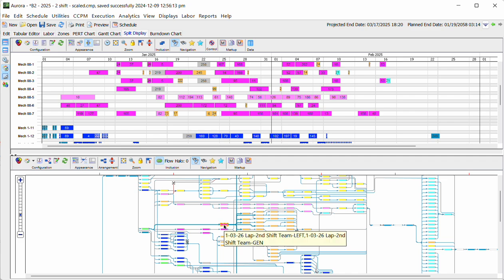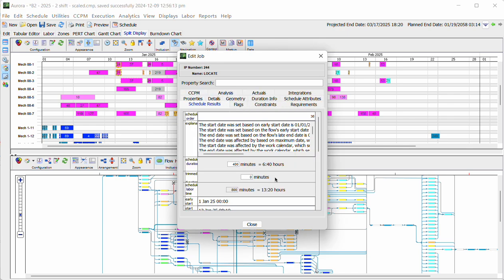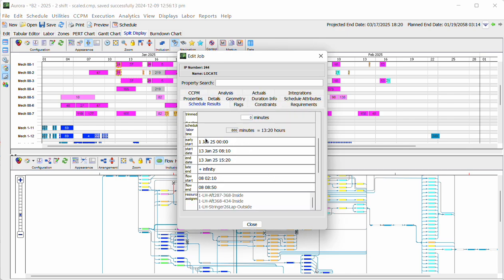This is an important installation or update activity for a major part. Let's say that I had a testing activity earlier in the sequence to see whether I needed a new one, and it flunked the test, so I do in fact need a new one. As a result of that, this had been scheduled for January 13th. Let's say that I hadn't thought I would need a part, so there was no part restriction. Now there is going to be a part restriction. The earliest they can get it to me is the beginning of February.